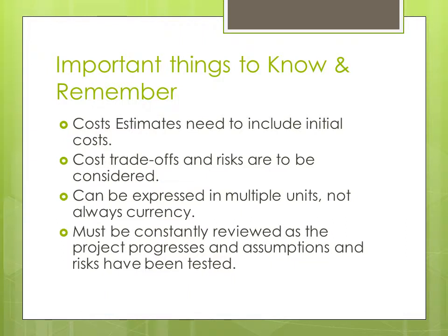There are a few important things we need to remember when estimating the project costs. First of all, the cost estimates need to include the initial costs, which are the time and effort that went into researching for the bid documents, such as the project charters and offer of services letter.